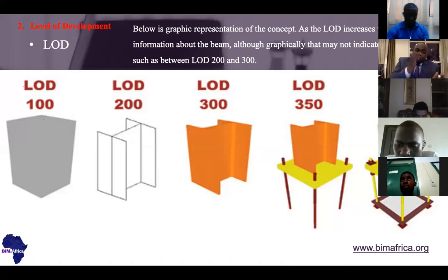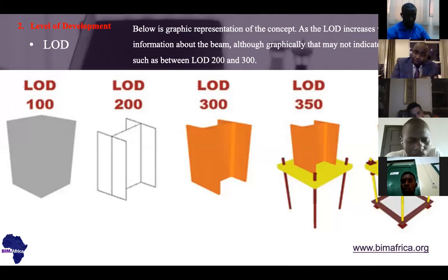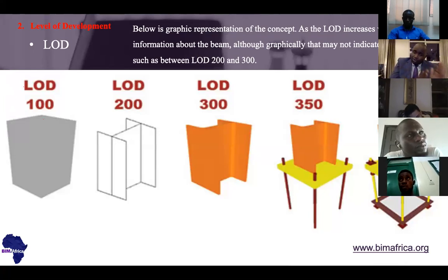It's just to make sure that at the different levels, you don't need to put all details at LOD 400 before getting everything known. No, you can make it LOD 100, and everyone can bring the information. The quantity surveyor could just see the volumetric analysis and ask, can I make a kind of rough estimate? If the estimate is, for example, higher than what is needed, he can inform the client, even from level 100, to make sure all other stakeholders are able to reflect quickly and make some changes at level 100. Before, okay, if that is clear, we can move to